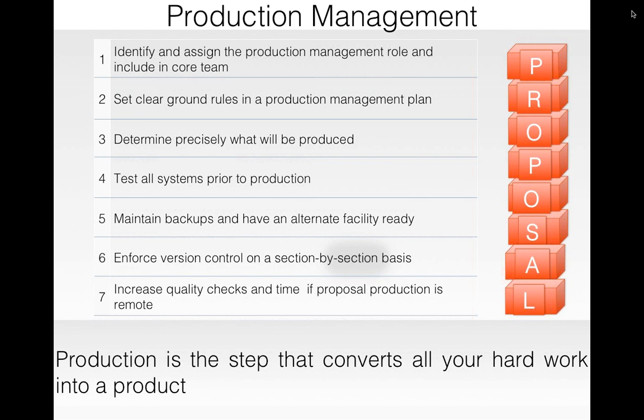You should have a proper file naming convention to capture the versions, or if you are using a repository, then possibly you can use a document repository like SharePoint. You can use their functions for managing the version controls and only keep the updated version. All the other versions you can move to the archives.